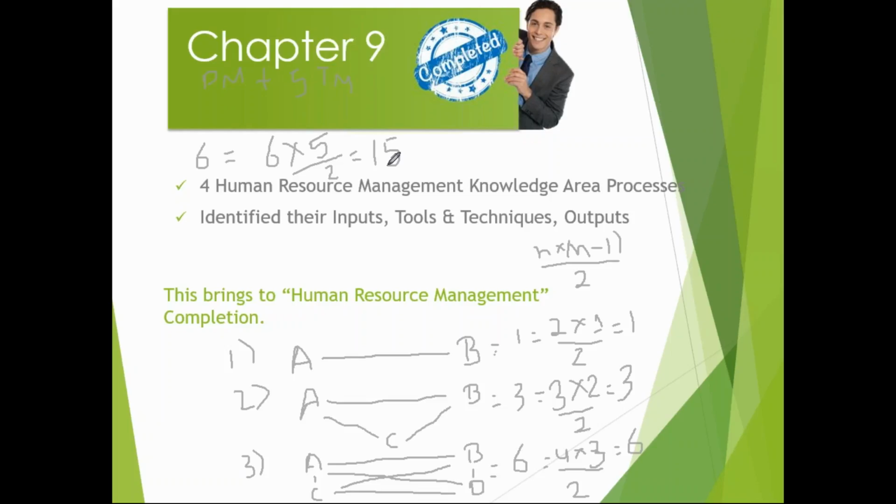So if it's too huge, then you need to delegate certain responsibility of a few of the stakeholders to some of the team members. It could be a dedicated person to do communication with the stakeholders, right? You might hire a dedicated person just to do communication if it's too complex. Another theory is that if there are more than 8 people inside the team, then the communication channels become complex and groups tend to form up, right? So that's just a theory again.